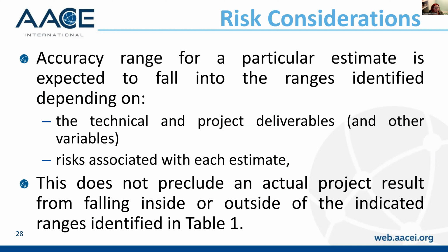The dependency on this is really about the quality or completeness of the technical and project deliverables, and the risks associated with the estimate. So in addition to the degree of project definition, the estimate accuracy is also driven by a number of systemic risks, including the level of new technology in the project.